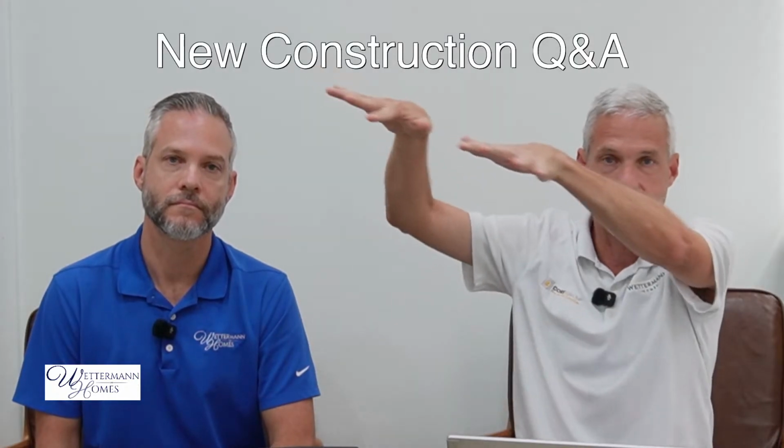What I'll say is we have comprehensive site plans in some of the areas that we build. You will have pinpoints on the site plan that show all the grading needs to flow in a certain direction. Our excavators have laser levels, so they know exactly what level to have at a certain point, and then as they move forward, that'll be lower and lower. If there's any negative drainage, there shouldn't be, because they would have fixed that at rough grading. If there's a problem after the fact, they will just regrade.